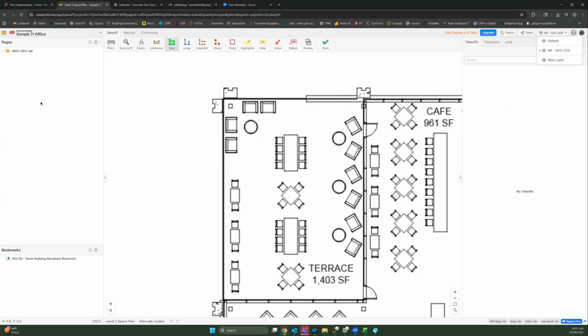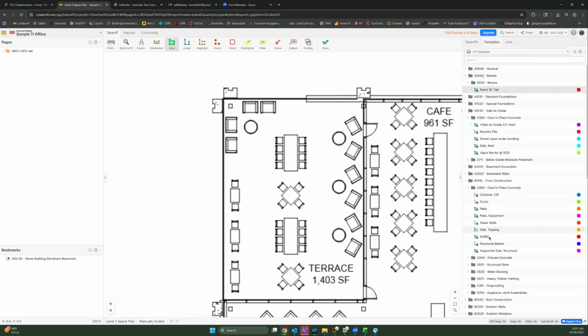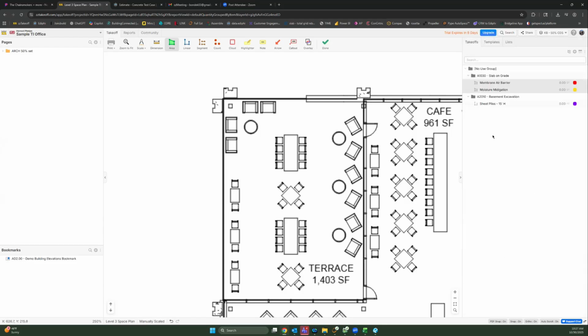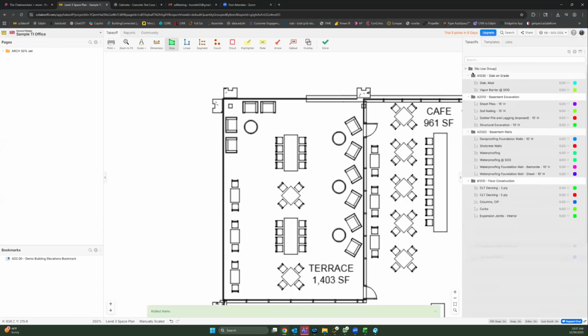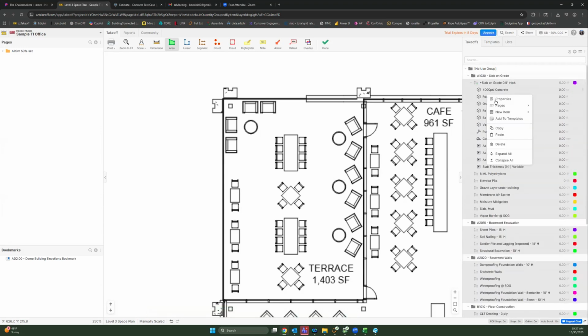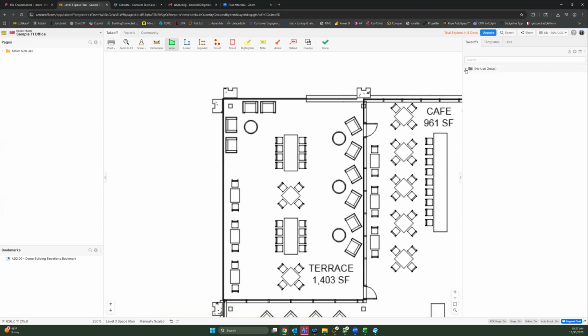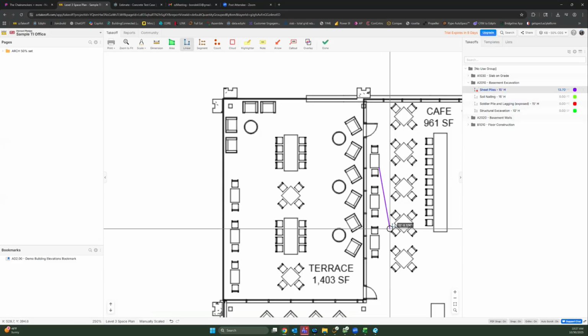Yeah. Version control is a big thing. We've had a lot of people request version control. And one thing we've added in as a short-term fix was the duplicate job when you get a change order or an addenda. A lot of people are duplicating the project. I don't know if you guys have used that concept at all, but it does help freeze your takeoff of what you've taken off at this point in time, and then duplicate the project so you can do a takeoff or modify a takeoff on a separate project without having to alter the original takeoff. I don't know if you guys are using that duplicate job for that purpose, but it's helped a lot of people out since we put it in there.